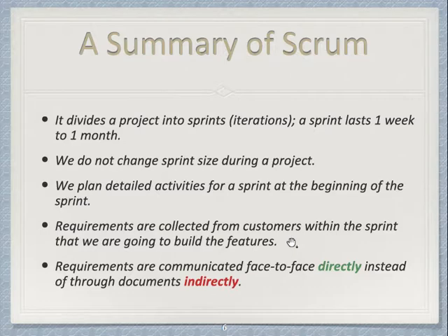Requirements are collected from customers within the sprint in which we're going to build the features. In waterfall, when we learn about the requirements, the analyst would write down the requirements in a document, and then someone would sign the document and say, this is the very detailed requirements that we agree. But Scrum does not have this idea. Scrum does not believe in creating many different documents. It will create the very minimal of documents.